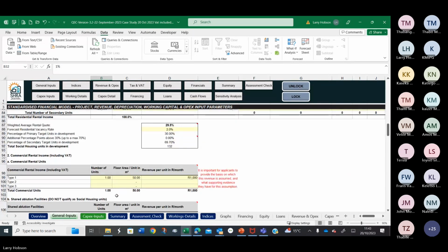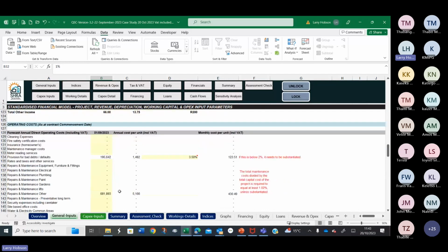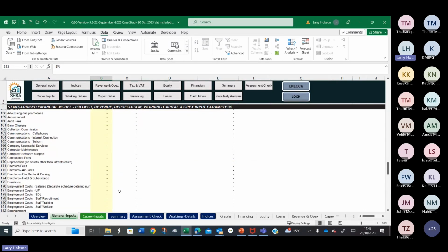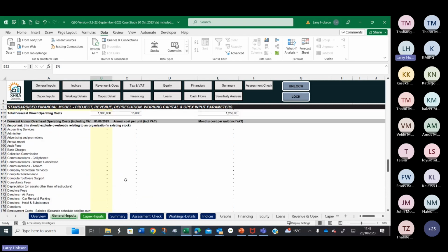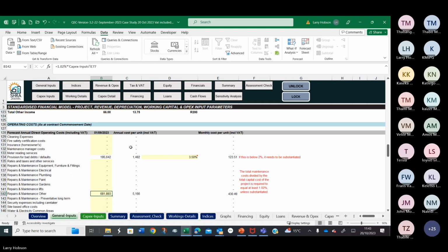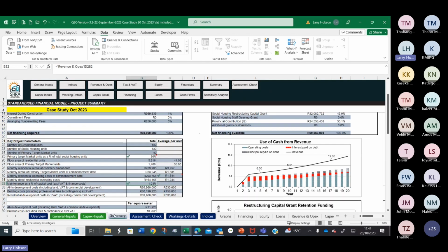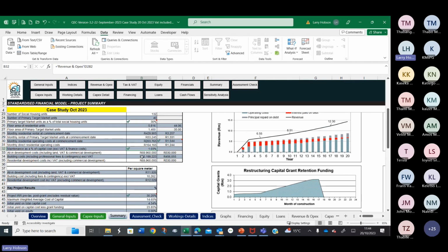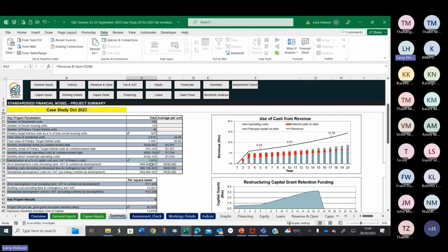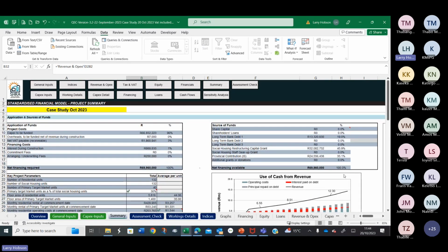So I see we're not meeting that metric any longer because our costs have changed. We need to get the maintenance to 1.02 of the maintenance costs again. So overhead forecast, here's the maintenance. Maybe we'll just need to make it 1.03 to get that above the line. Yeah, and it does. It was probably a decimal point that was pushing it below. So we've got all of those measures in place.